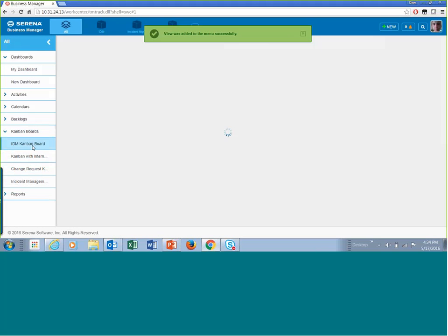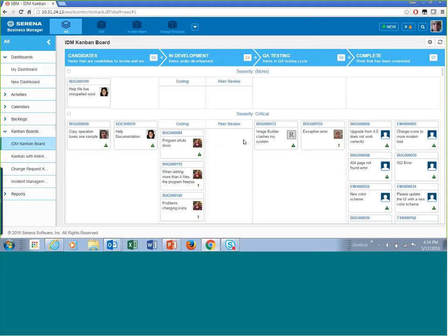So if you take a look at the Kanban board views, here I've got a representation of multiple swim lanes. In this demo, I used not projects as the field, but severity as the field. You'll see here that I've got the multiple columns. This contains various things. You can see the WIP limit. Here I've exceeded my WIP limit. That's why it's in red.